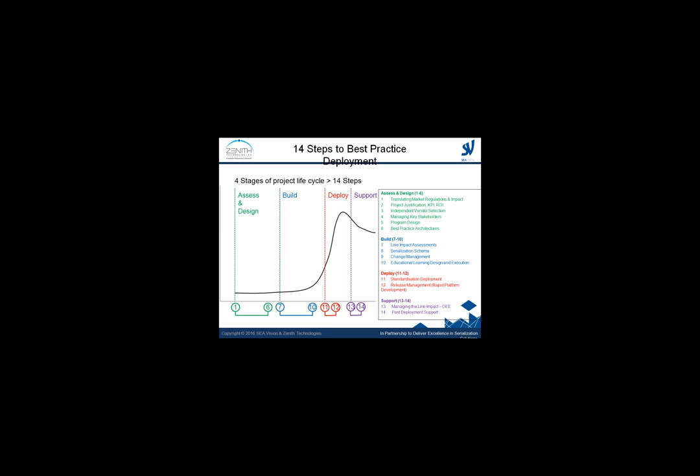As the deployment phase is brought into the picture, your headcount's likely to increase. Once moving into the deployment stage, and again, this could be down to the size of your company, you could see the deployment stage being one of the larger pieces of work. And then finally moving into the support phase, which is really about retaining knowledge, retaining that ongoing staff training. You're going to get new software releases from vendors in line with new market regulations as they come online.